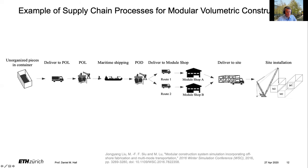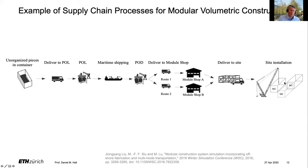Here's one example of a supply chain process for modular volumetric construction. They modeled unorganized pieces that had to go through delivery to ports, get loaded onto boats, go through shipping — this would be an international supply chain — then delivered to a module shop where modules are assembled, then the modules go onto a truck, and a crane installs the modules on site. There are many different configurations, and you will have to think about what your own supply chain processes look like — who is touching what material and when.